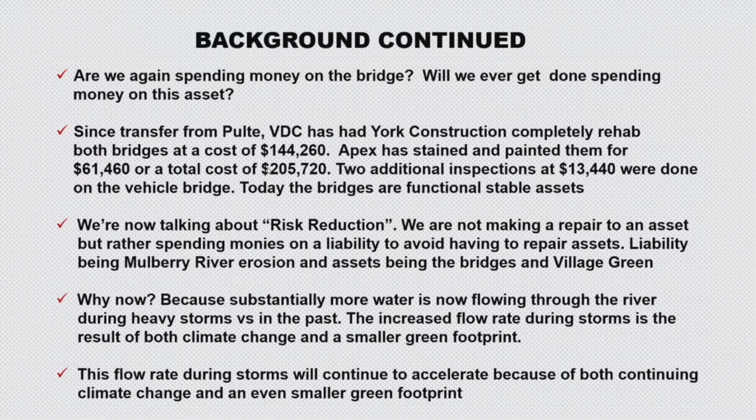And Apex stained and painted them for another $61,000 some change. And then we had two inspections, a deck inspection and a full structural inspection, and they totaled $13,440. Today, the bridges are both functional and stable assets.